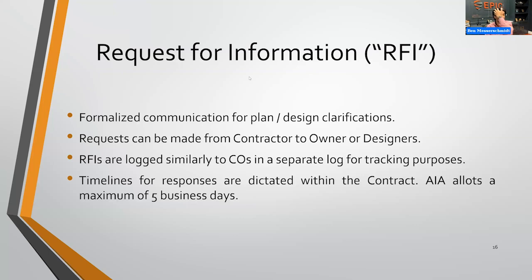Okay, moving on to requests for information, or RFIs. RFIs are mainly just a documented question for everybody to go ahead and see. It could be amongst the contractors, contractor to owner, contractor to designer, or contractor to subcontractors. This could be something as innocent as, hey, what elevation are we building the slab at? Where do you want this wall? Because plan sheet A says this, plan sheet B says that.